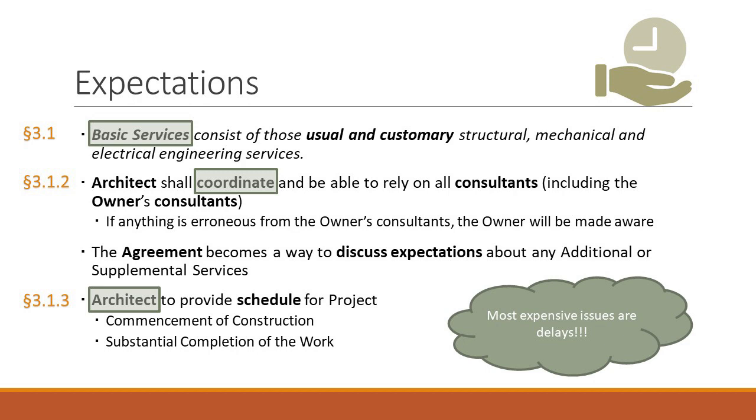In every construction contract, the most important element, as far as I'm concerned over my 30-plus years of practicing construction law, is that the most expensive thing in a construction project is delays. It causes people to accelerate and everything else. So this is one of the first points where it says, hey, if you give me a date, you've got to meet it. And if you fail to meet the date, unless there's a reasonable cause, maybe the owner went from a 3-bedroom to a 4-bedroom house or what have you, neither the owner nor the architect can exceed those dates. And it's on both sides.